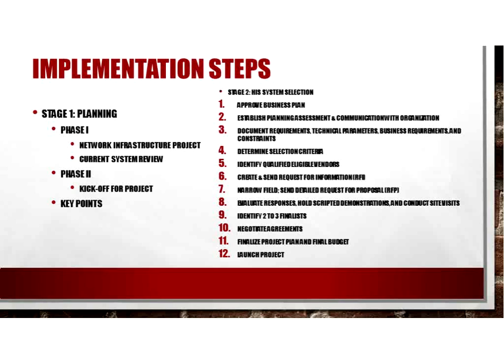Maybe the remainder will be due within 1 year of that date. And your payment is based on accomplishments of those milestones that were agreed upon that's going to lead to that successful implementation. If an organization does not feel comfortable doing these negotiations, they can find a lawyer or a consultant that's qualified in doing HIS contract negotiations. So all this is in step 10 where we're negotiating the agreement.